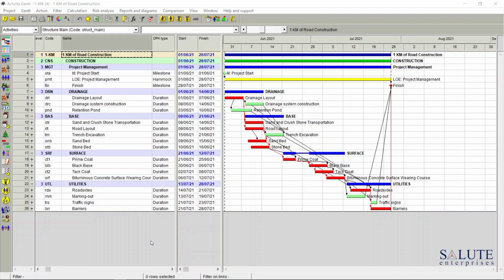There are two main approaches used to estimate project work: duration-based and volume-based. This schedule here was developed based on the activity duration approach. An alternative approach is to estimate duration based on volume of work and productivity of assigned resources.